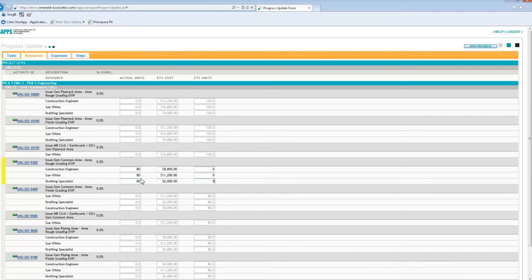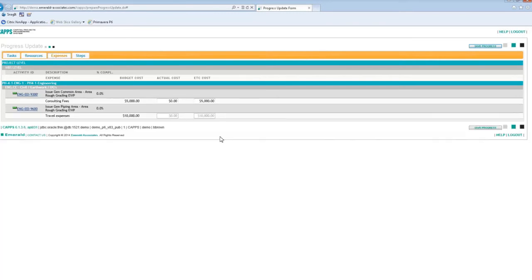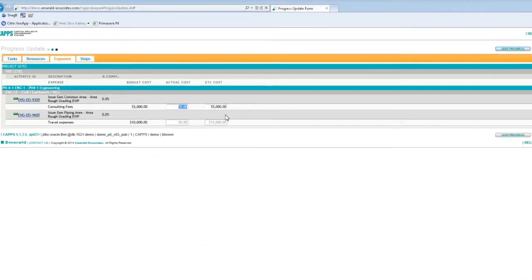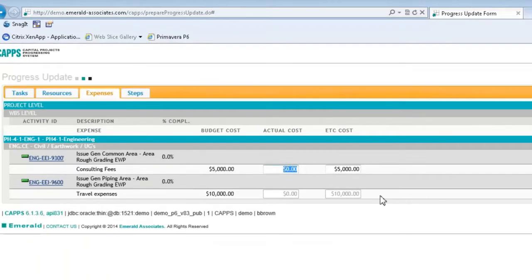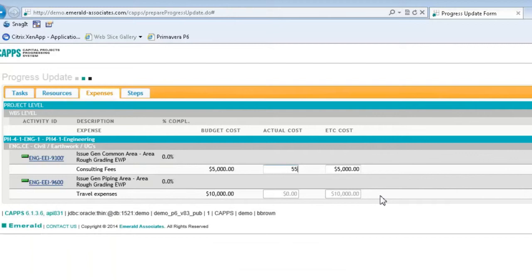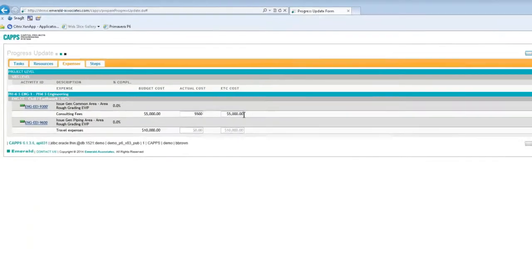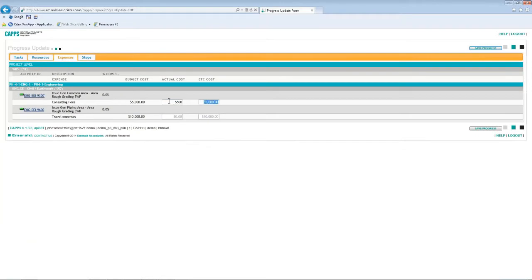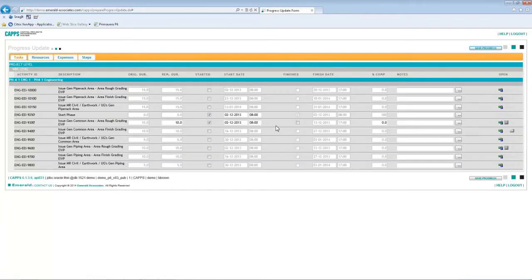And this activity also has expenses, so on the expenses tab I can update the actual cost information. So I had budgeted 5000 for consulting fees on this task, but in fact I spent 5500. So I'll enter the actual cost information, and my remaining cost is zero. And I need to mark the task as completed.